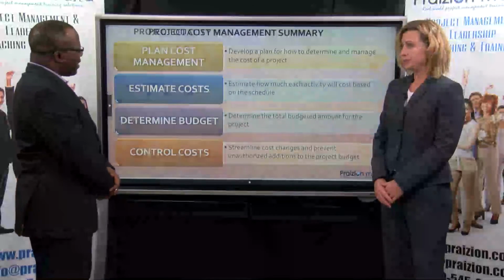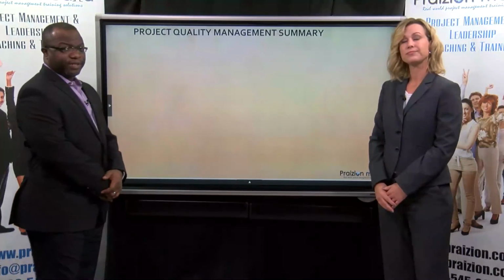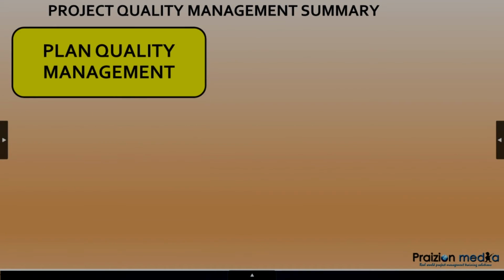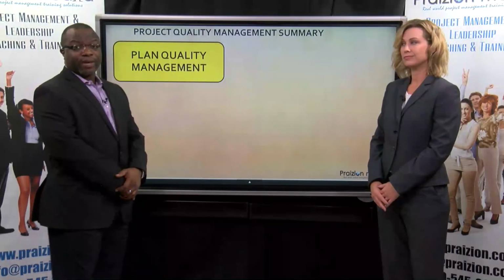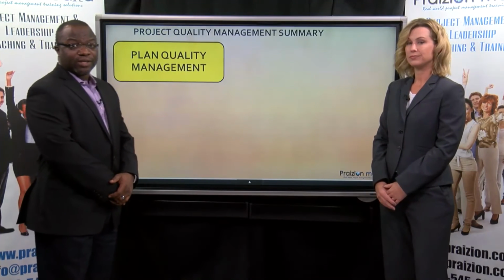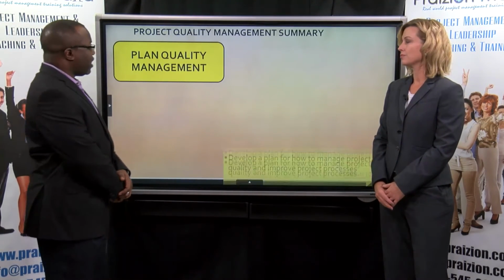And as we think about that, don't forget quality management is very important. So the first thing we do here is we plan quality management. Emily mentioned the cost of quality, and that is really thinking, how much are we going to spend on testing? How much are we going to spend to ensure destructive testing is implemented in the project somewhere if necessary?